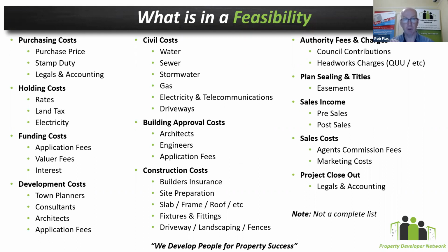What I would be cautious of is this: when you're doing the costings in all of these other line items that you've done here, you should be as accurate as humanly possible and then let the contingency capture the variation. What tends to happen, I see in early developers as they're learning the process, is they get quite conservative on every single line item, and then they add contingency as well. And what it does is put fat on top of fat.